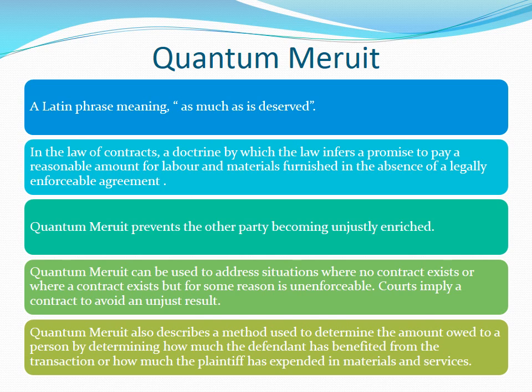Quantum meruit also describes a method used to determine the amount owed to a person by determining how much the defendant has benefited from the transaction or how much the plaintiff has expended in materials and services.